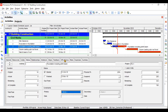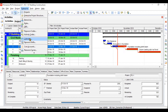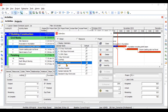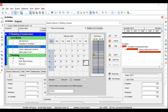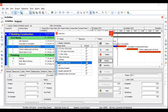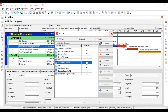Moving on, we will assign and create calendars. In the calendars option, we'll create new calendars based on our site profile — how the site runs, from what time to what time. For example, we created an IT building calendar. You can see working days and detailed work hours: it starts at eight, has a one-hour lunch break, then ends at a particular time. We will create and assign calendars to our project, to activities, and also to resources.